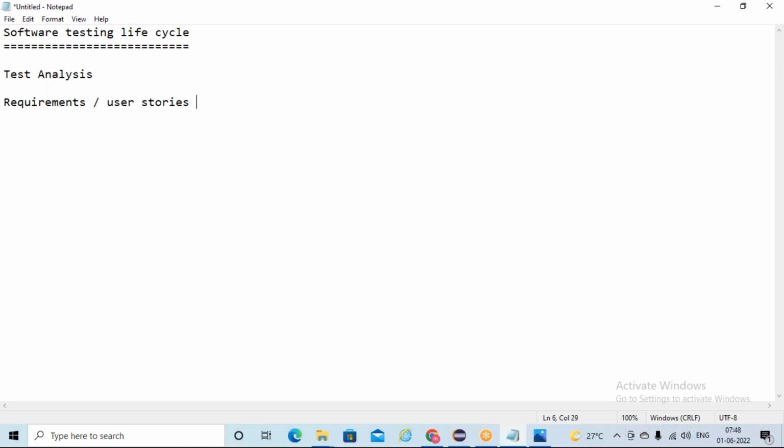For that, you'll connect to the business team, and first we'll have a grooming session about that particular sprint. Like the first sprint we are starting, let's say the sprint is planned for three weeks. So before that, in the first week, all we'll do is go for the grooming session. We'll discuss the user stories the client has given, understand them, and estimate each story, how much time it will take.